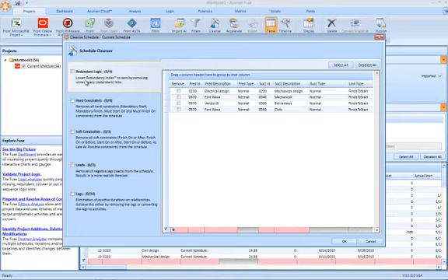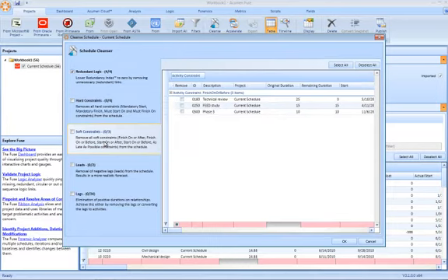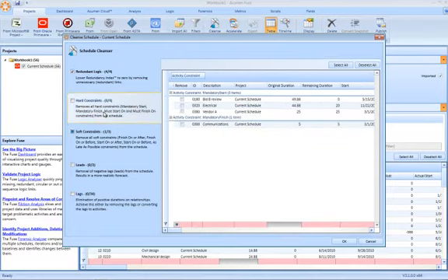And within each of those groupings you can now define which individual activities you want to execute the cleansing action upon. So for example, under soft constraints we could explicitly choose feed study. Within hard constraints we could select all mandatory start and all mandatory finish constraints.